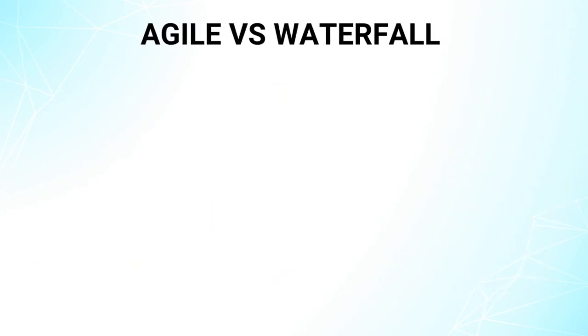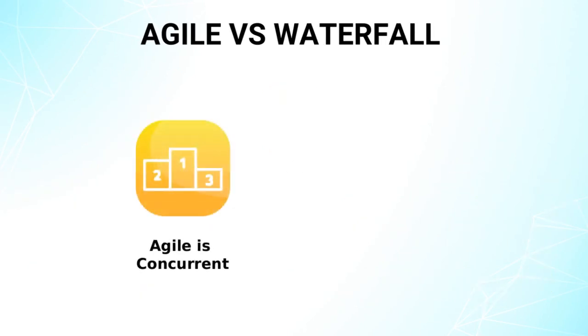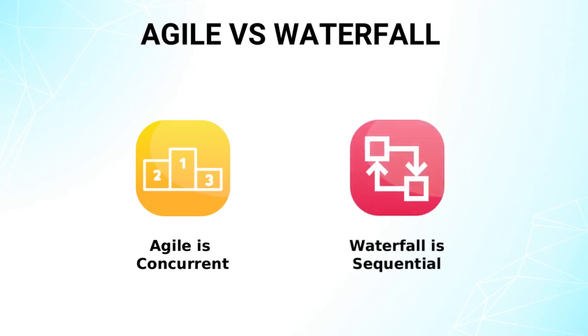And Agile processes are more concurrent, with each feature going through phases quite quickly. If you have multiple developers on an Agile project, each of them may be working on different phases at any one time. But we have seen that a Waterfall process is more sequential than an Agile process. Because of the fundamental differences between Waterfall and Agile processes, project management for the two approaches is different. Waterfall is more of a predictive command and control process with big upfront planning, and Agile is more of an adaptive distributed process with just enough and continuous planning.